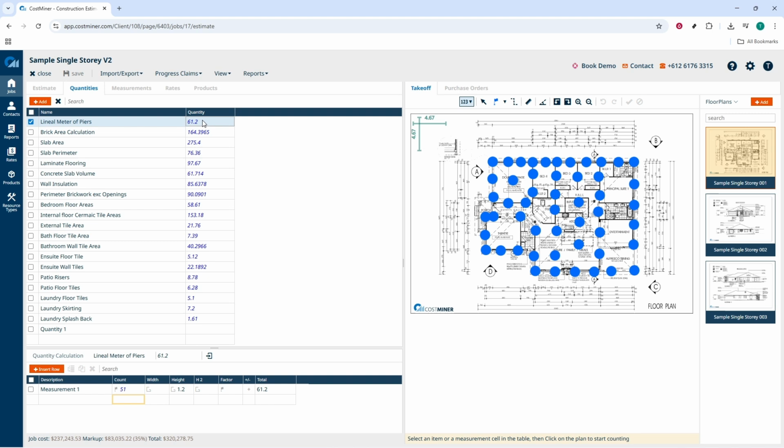As you adjust, keep brief notes in the project description or comments so a reviewer can see what changed and why. After each set of edits, scan your totals, taxes, and markups to be sure they still align with the project's rules, and confirm that any rate updates flow through the entire estimate.